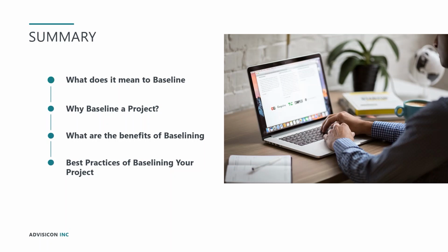A little side note I do want to add before we end today is the reason we keep baseline 0 always current is because with report packs, they need to pull your current baseline when it comes to Power BI reports. And so you want to establish baseline 0 as your current baseline, which is one of the simplest ways to go. Because if you're having your Power BI report pull your baseline, you don't necessarily want to keep updating your report to switch between which baseline is current. So using 1 through 10 as your historical and your baseline 0 for your current lets your Power BI reporting experience be a little smoother.